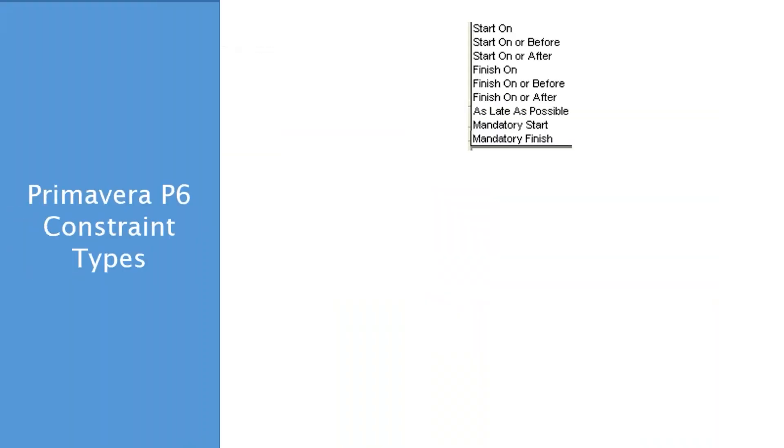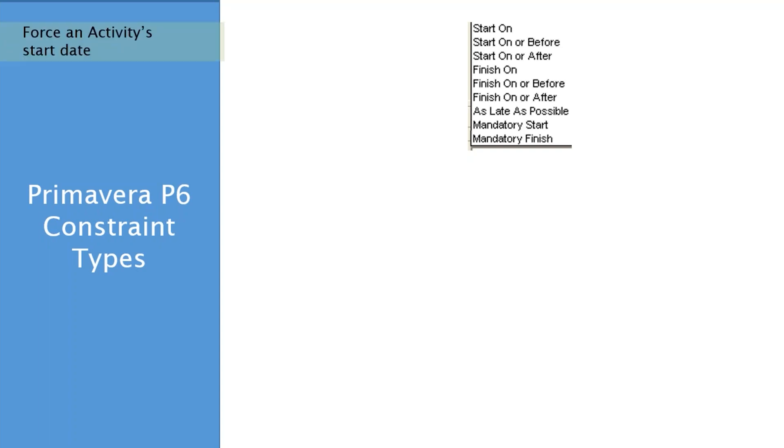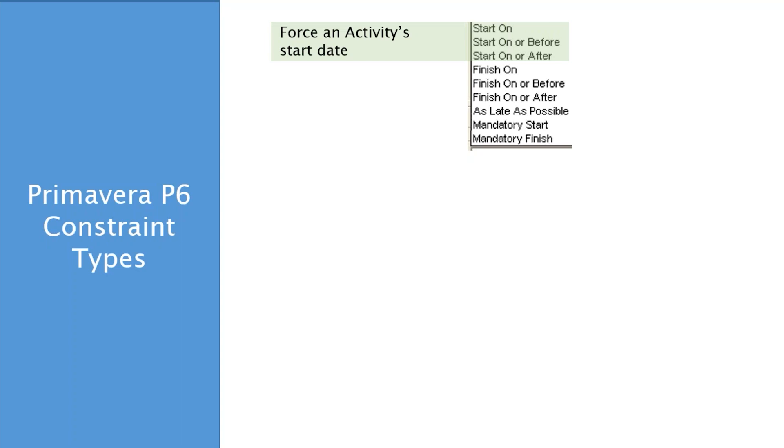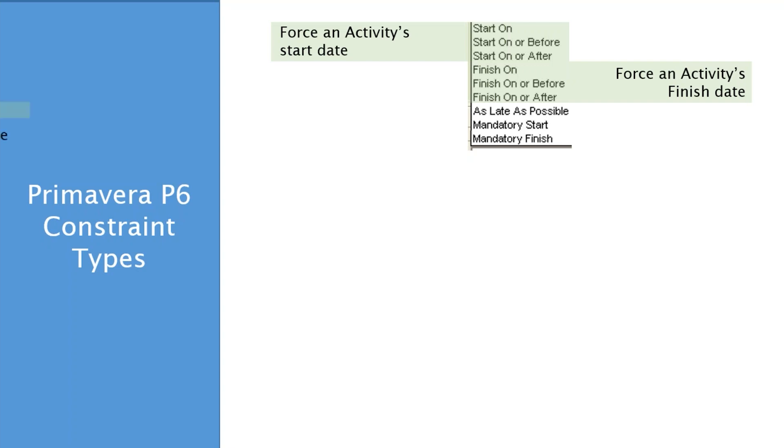Now, Primavera P6. When you are on an activity, in the bottom half of the screen, there's a field there. It's called Primary Constraint. When you see it, it gives you all these options. Start on, start on before, finish on, some other things there. So what are these all about and what's the difference between them? Well, let me see if I can break this down for you a little bit. There are different classifications for these constraints in the list. So the start on constraints are there to help you tweak start dates of activities. Pretty obvious. Same thing with the finish dates. The finish constraints.